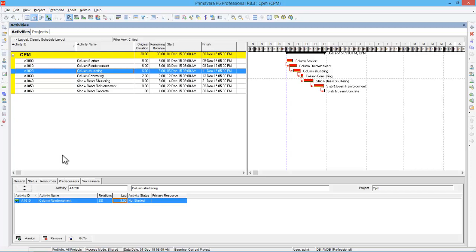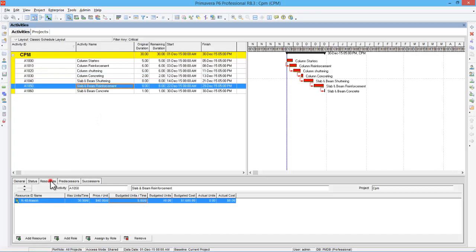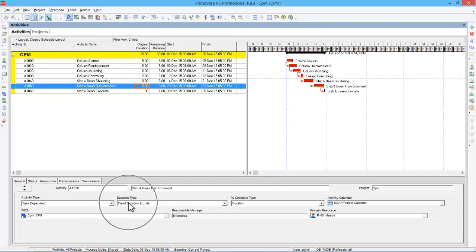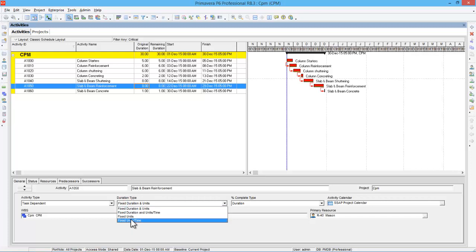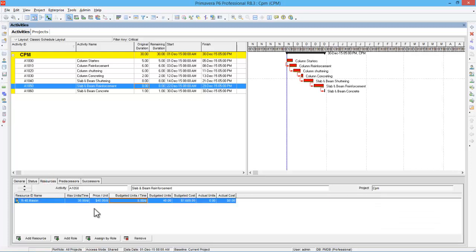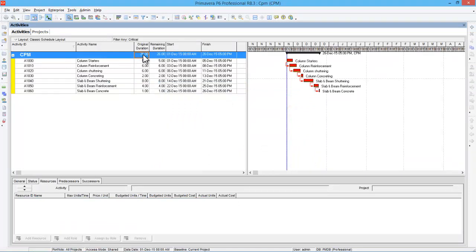Now let's see how crashing works in Primavera. Go to slab and beam reinforcement, then go to Resources. This activity is 8 days with 5 masons working per day. To increase resources, go to General and change the duration type from Fixed Duration and Units to Fixed Units. Then go to Resources, increase the masons from 5 to 10, and press Enter. The slab and beam reinforcement duration changes from 8 days to 4 days. After scheduling again, the total project duration goes from 30 days to 26 days.